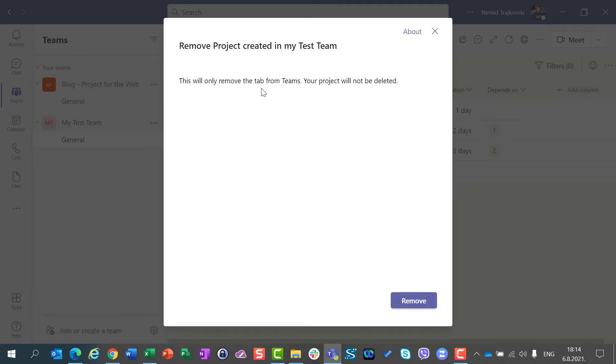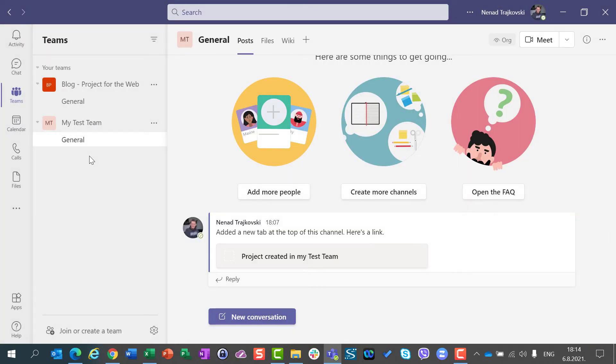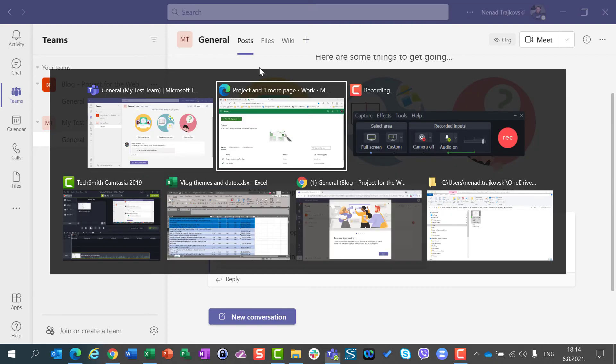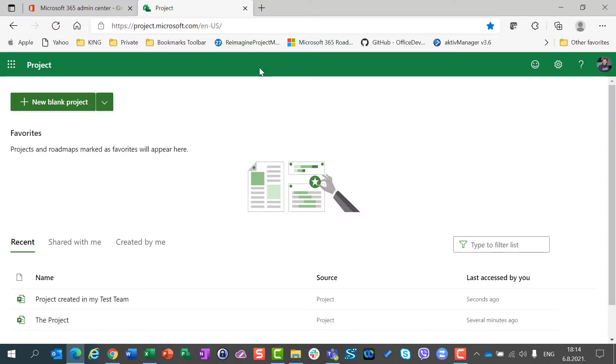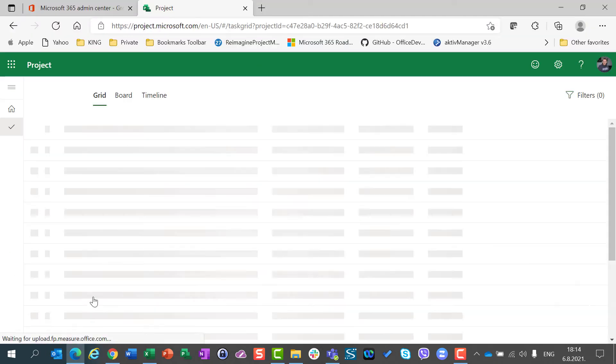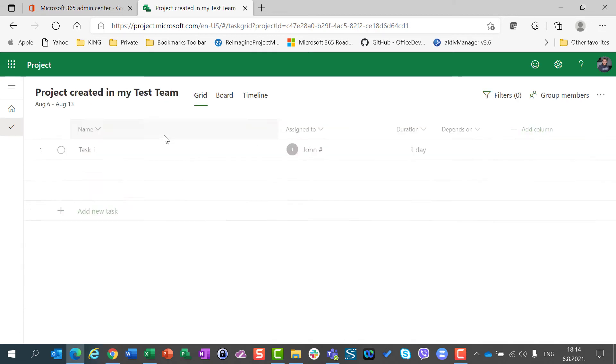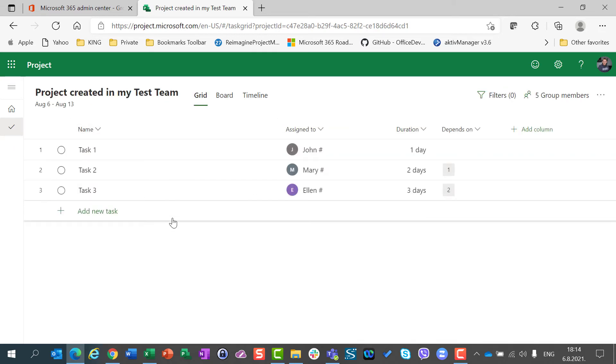Your project will not be deleted, so my project is not going to be deleted. I can't see this project anymore in Teams, but if I go back here, I can see this project and all tasks are here.